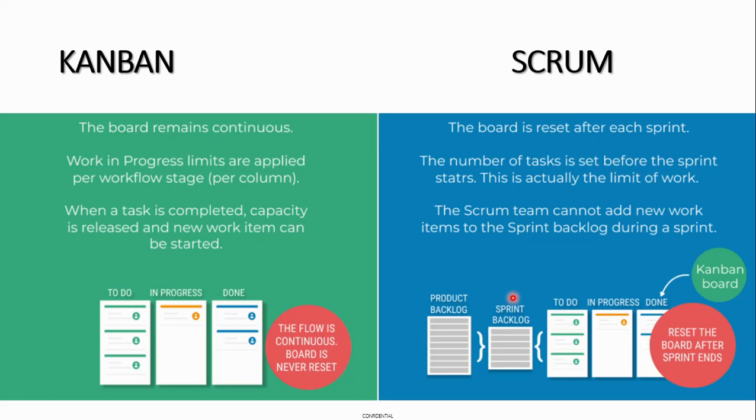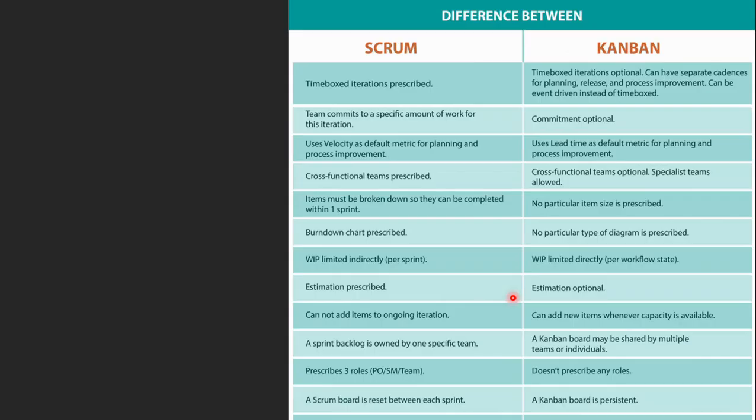So basically, per sprint, the sprint backlog is fixed. In Kanban, it is not fixed. It is continuous, you pull it out. So again, to recap, Scrum is time boxed, whereas Kanban is not time boxed, it's a continuous flow of work, and during that continuous process, you start showing the customer the system, and then take feedback again from the customer side.